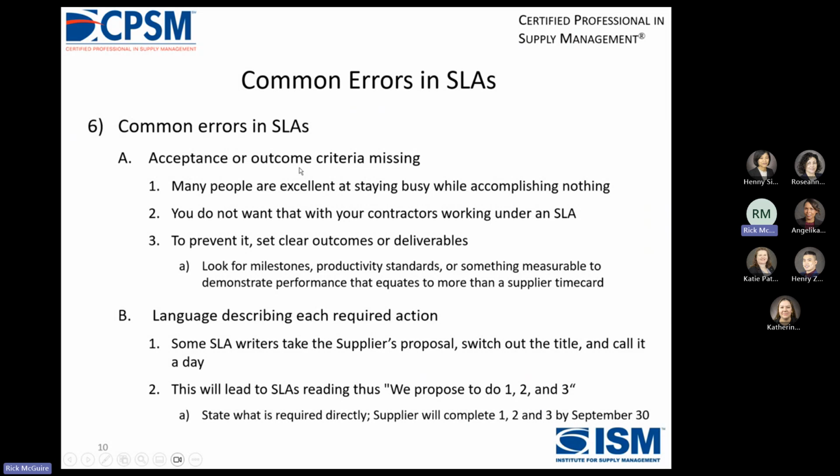Common errors in SLAs: acceptance or outcome criteria is missing. So you don't really know when they're done. Many people are excellent at staying busy while accomplishing nothing. You do not want that with your contractors working under an SLA. So to prevent it, set clear outcomes or deliverables. Look for milestones, productivity standards, or something measurable to demonstrate performance that equates to more than a supplier time card.